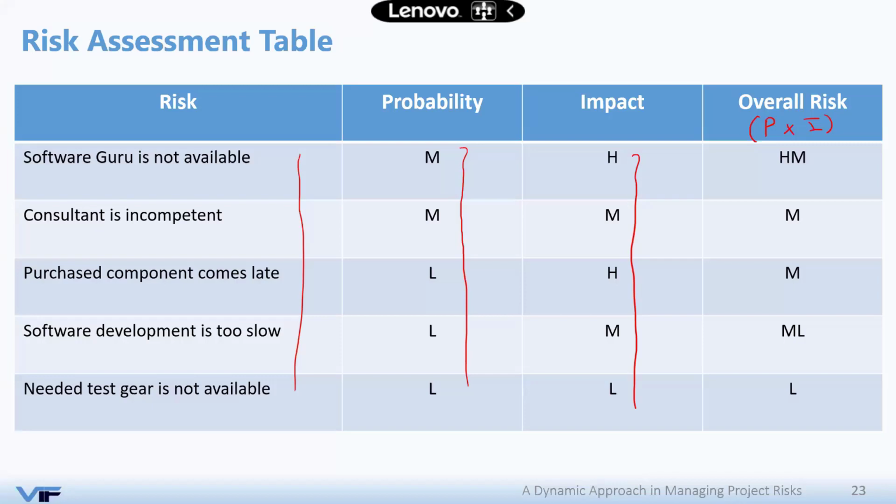After you are done using Excel, you will re-rank the risks using the individual risk scores. So anything that is high, for example, will be ranked right here on the top. Anything that is low probability, low impact will be at the bottom of your table, and you can later decide to take it out from the risk register to something we call watch list.